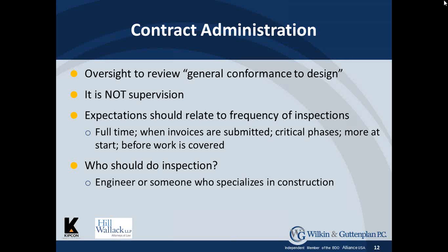Your expectations of the person who's overseeing the job should relate to the frequency of inspections. For example, if it's full-time, there's an expectation that the person who's overseeing the job is making sure it's done pretty much in conformance with the specifications. But as soon as you get away from that and you just have inspections when the invoices are submitted, or critical phases, or before work is covered up, like when the shingles go back in, there's much less responsibility that can be put on the person who's doing the oversight.